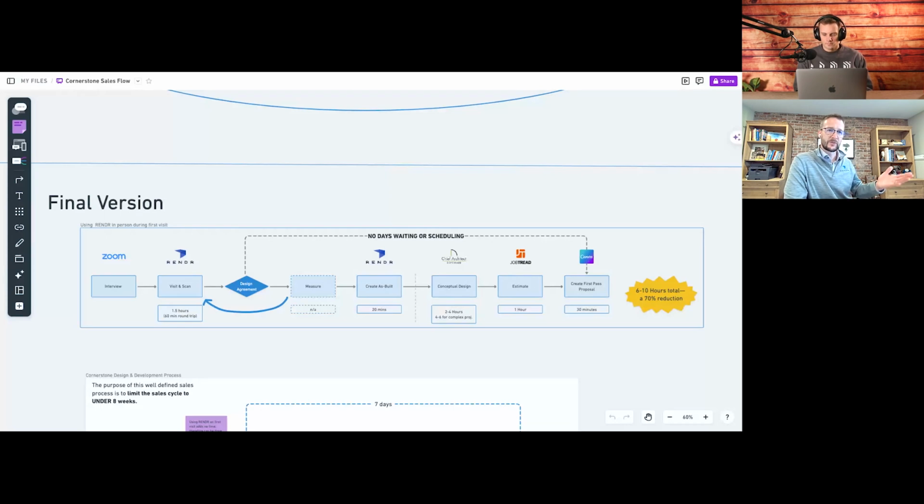If this pans out, this is how much you're going to spend. And for them, that initial estimate is what they cling to. So our goal is to make sure that initial estimate goes out and it is almost all the time beat. When they start making selections, their allowances are coming in under that amount. Because we found out that if customers are happy with how they're doing on the budget, they're willing to spend more, not only up to that initial budget, but they save $5,000 on cabinets, they're willing to spend $10,000 on a fireplace.